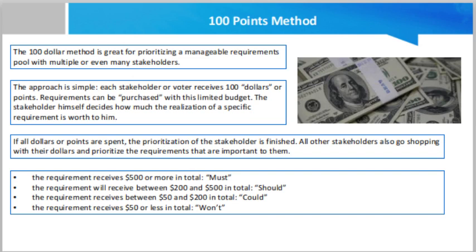One advantage of assigning numbers is that each stakeholder can do this for themselves. For a final result, the rounded average value of each considered requirement is used. Again, think about what thresholds should be used to differentiate requirements in the context of the project. Very low rated requirements should either be excluded immediately or at least formulated as nice to have features. Transparent communication with the stakeholders is extremely important here. This avoids uncertainties and disappointments during the project.